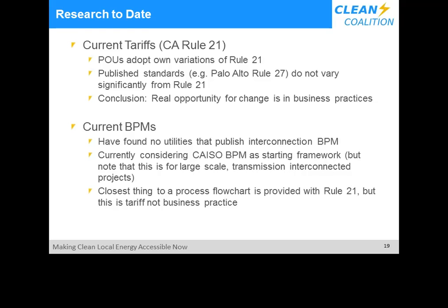And then we have this possibility of looking at the Vermont registration process, which some of you may know was extended for up to a 10 kW solar system. It turned interconnection from an application and study process and permission process into a registration, where it's literally a one-page form that a solar installer fills out to say, I'm going to interconnect our system. And the utility then has a certain number of days to respond to that form if there's a problem. Otherwise, it's assumed they can just plug it in.